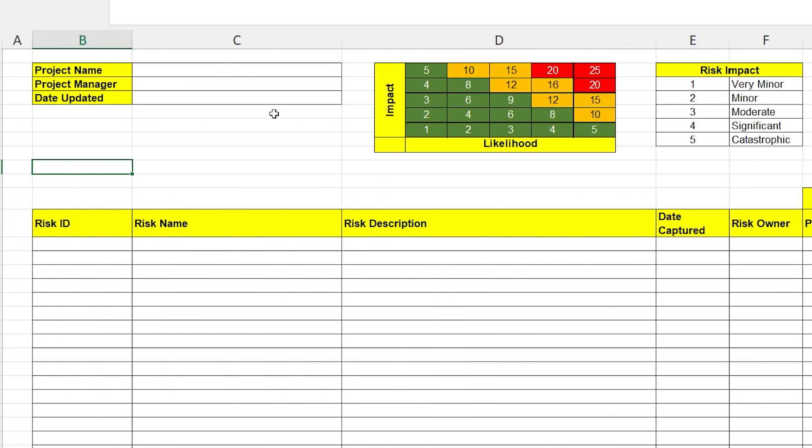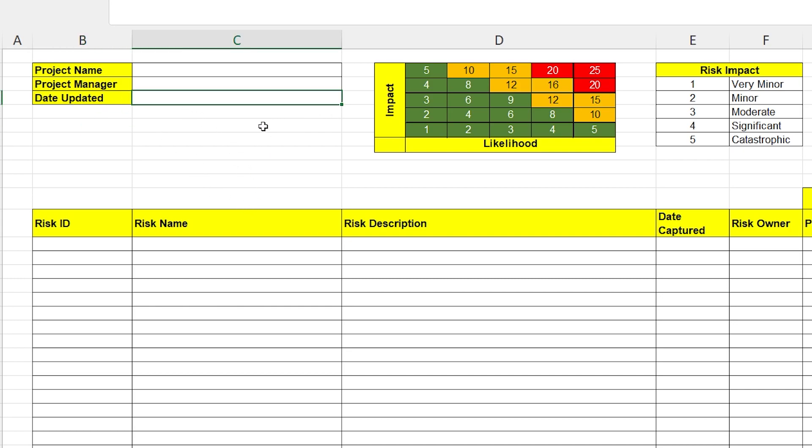Firstly, a section at the top here where you can include your details and the details of the project. I've deliberately not included a formula to put today's date in here, and the reason for that is you may want to save versions of this so that you've got an auditable trail of the work that you've been doing. And you may want this document to be a snapshot of your risk register. It's not the kind of thing you'll be asked for a lot, but on the one or two occasions when you do get asked, you'll be grateful to have had this version sitting there in your files that you can easily reach to and say, here you go, here is the risk register with a snapshot of this particular date. It's worth adding that if you work on compliance-related projects or regulatory projects, I would say you definitely need to do this.